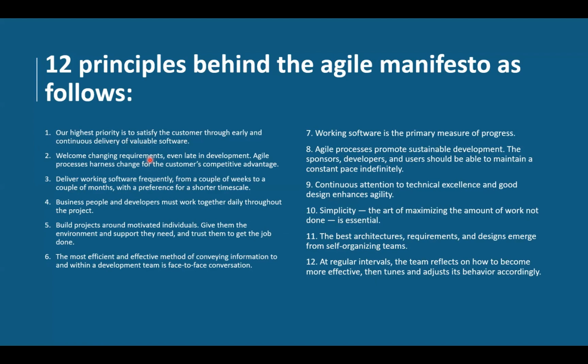So the idea is this, think about it. Waterfall, you give the company to deliver this app, and in 6 months' time, they come with the app. But Agile, in 1 month time, the app is ready. You've given them 6 key features that you want to be in the app, but 6 of them are not ready. But the beauty of it all is that in 1 month time, at least 2 of them are ready and you've started using it. Whereas in waterfall, you have to wait till everything is ready. So that's the ideal about working in this agile methodology.